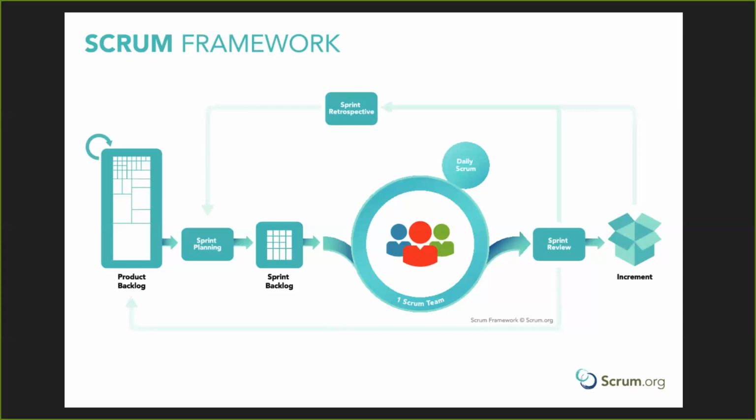Okay, so you've made your release, and then the other hallmark of sprint is continual process improvement. I think that's actually the most important piece. After you've done a sprint, you look back at what worked, what didn't work, and what's one thing that we can change to improve the process. So as you're doing more and more of these sprints, your team comes together and they really figure out how to work together, what works and what doesn't work.